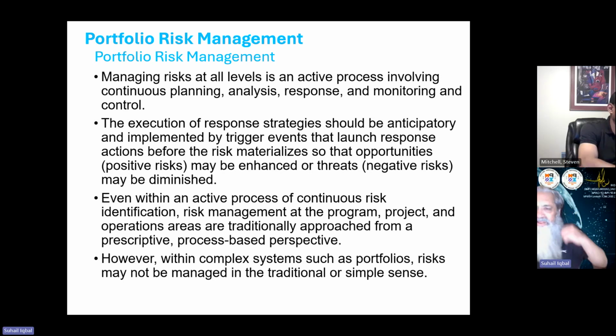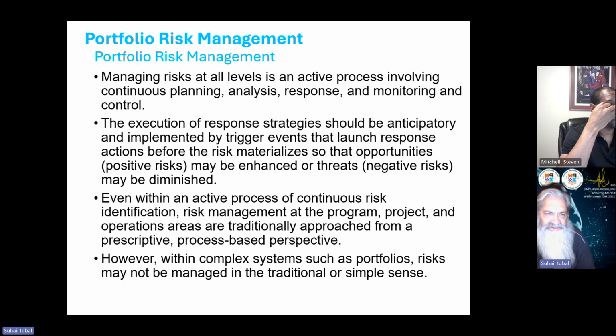It is recommended in Agile that you should hold on your documentation and plans till the last responsible moment. Say 30th June is the last responsible moment. We should decide not later than that. Naturally, then it will be too late.